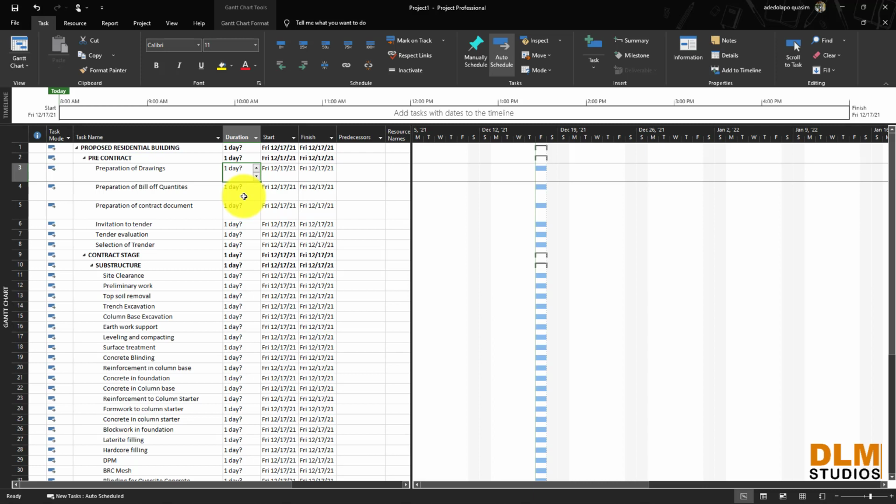So you can just go to site in the morning, take note of the activity that is to be done that day, and the number of labor. Let's say for block work, the total number of workers on site for that day is 5 or 10. You want to know what they'll cover for that day. At the end of the day, once they are done, you can go back to measure the entire work done, and they worked from 8 to 4 or 8 to 5, that's 8 hours.